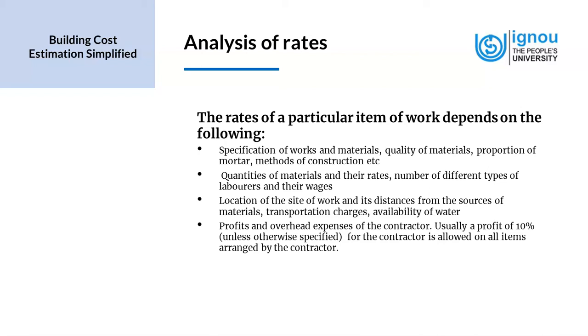And for smaller projects and for projects with high specifications, or especially hospitality projects, etc., the profit and the workmanship goes up, and usually the profit can be even more than the 10%. It could be varying from project to project, but usually something like 9 to 18% is something that we can take into consideration for arriving at the total cost of a project.